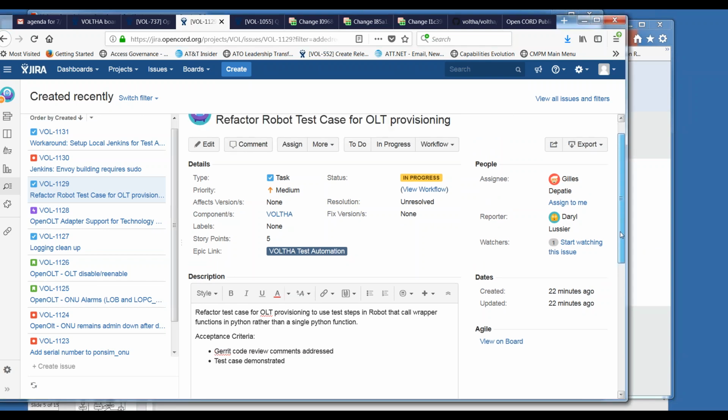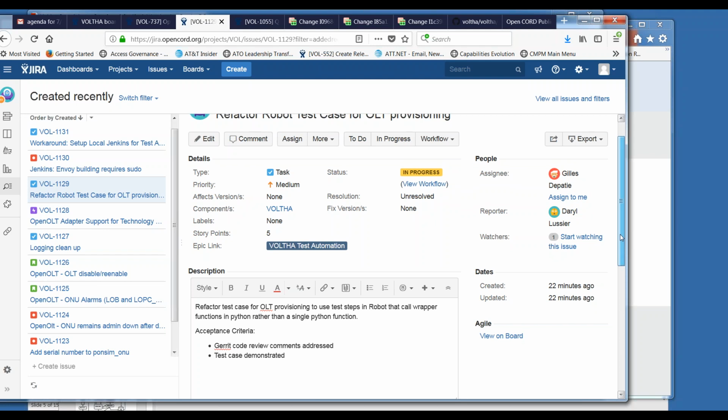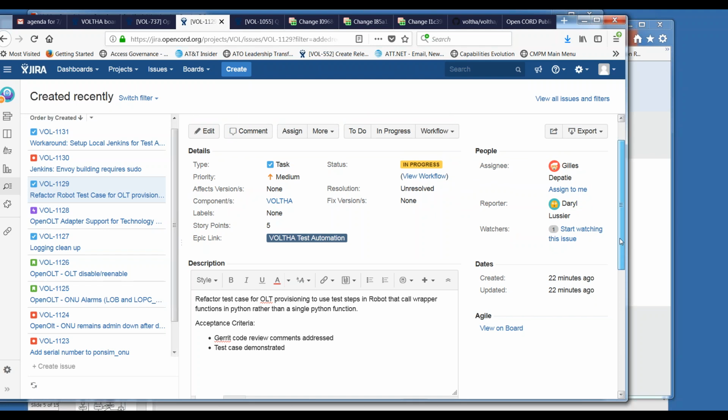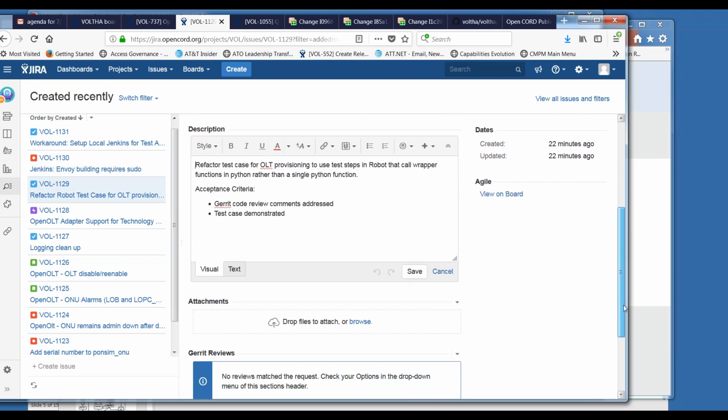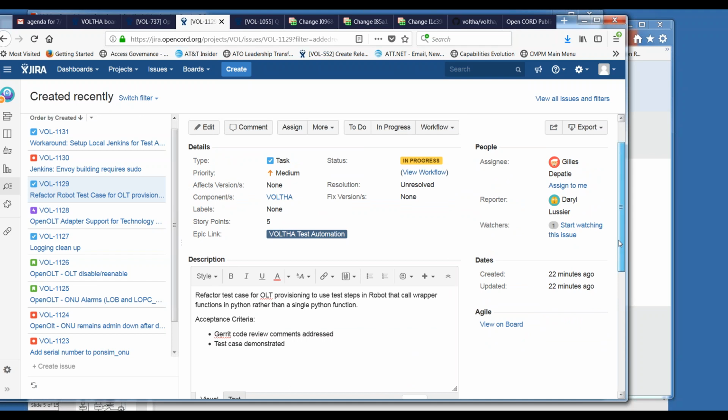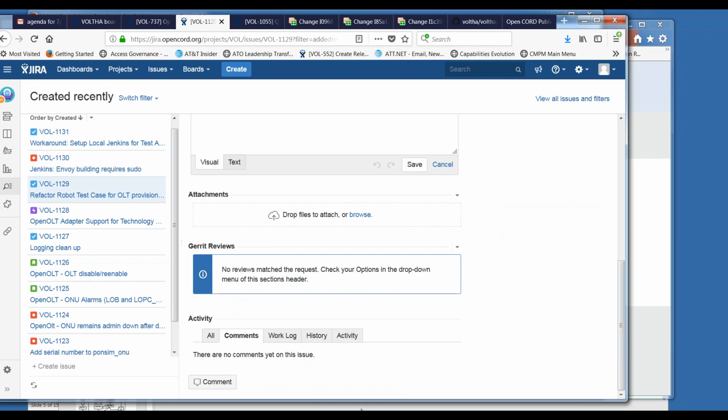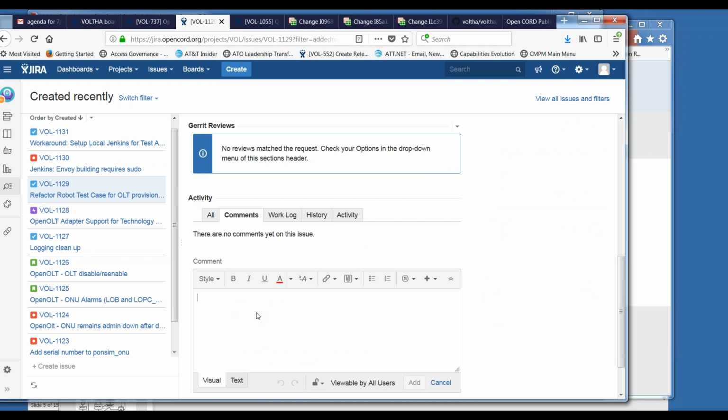Okay. Do you think so? Sprint 5 right now is targeted to go through the end of next week. Do you think this one, should we move this into Sprint 5? Do you think it will likely complete in that time? Yeah, I think it's better to move to the next phase because it comes with using the other framework, so it is interconnected. So it's better to move to the next sprint. Okay, so I'll target this for Sprint 6. Thank you for that.